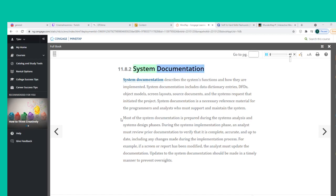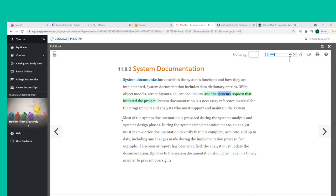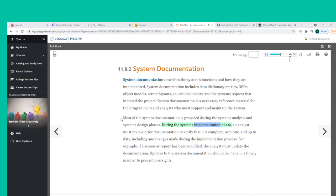System documentation describes the system's functions and how they are implemented. It includes data dictionary entries, DFDs, object models, screen layouts, source documents, and the system requests that initiated the project. Most system documentation is prepared during the systems analysis and design phases. During the implementation phase, an analyst must review prior documentation to verify that it is complete, accurate, and up-to-date, including any changes made during the implementation process.